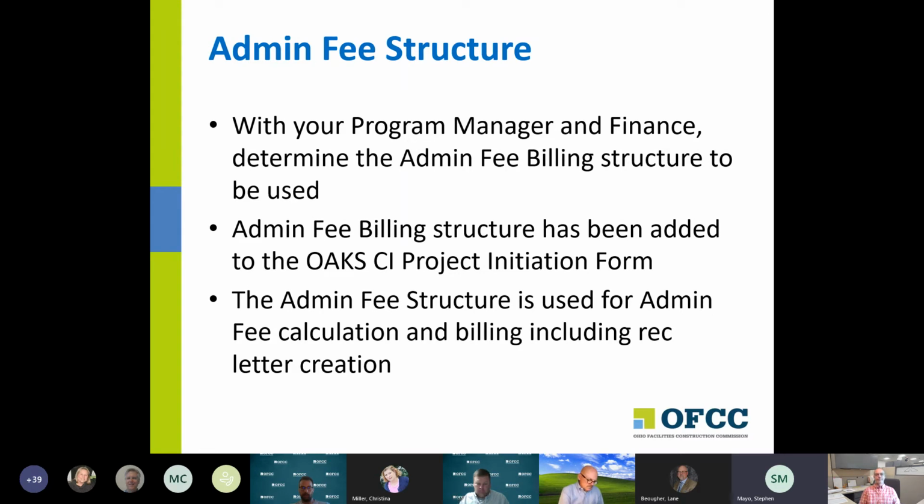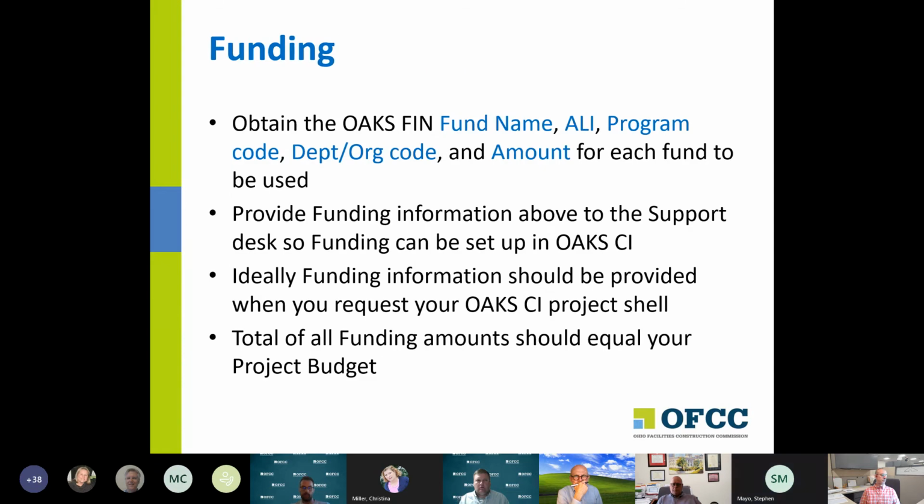And if you don't put it in, I'm sure that they'll be asking you for it before they create the project for you. That admin fee structure is used for admin fee calculation and billing, including the rec letter creation. And it's really the rec letter creation that made us change our current process. We had finance actually putting those in, and they would talk with the project managers in terms of what it should be. But now rec letter creation will fail if there's no admin fee structure in there, and it'll be wrong if the wrong structure is in there. We said, hey, let's back that up to the beginning of the project. We should know what fee structure we're going to use when we start the project.